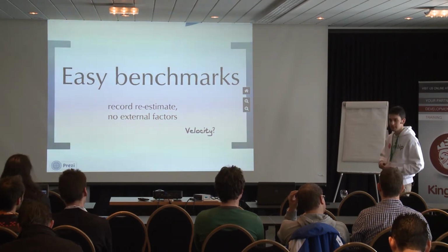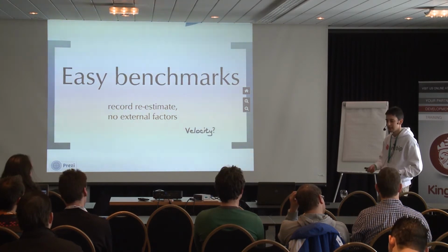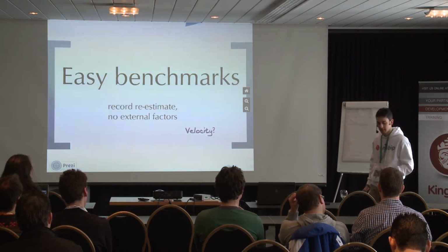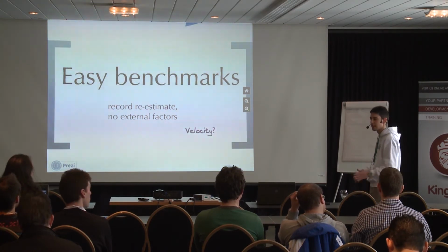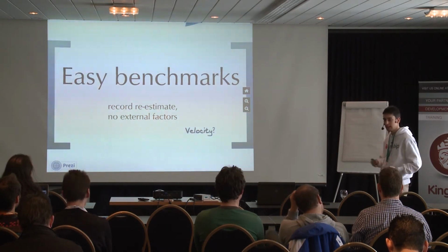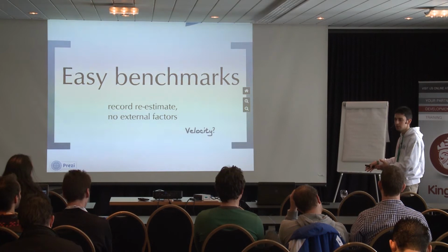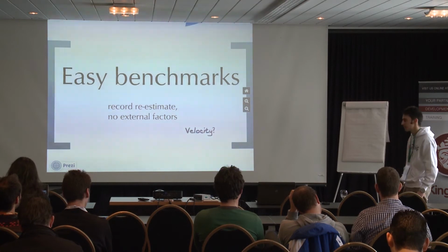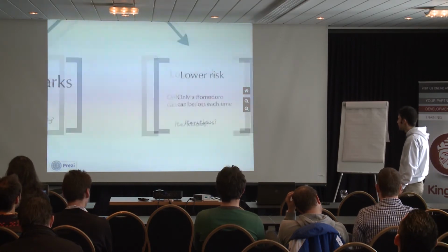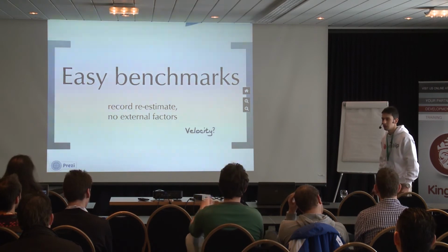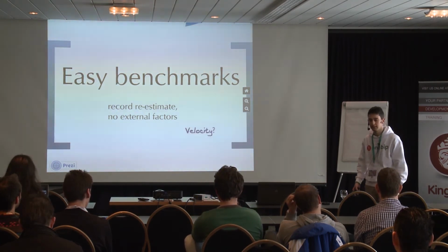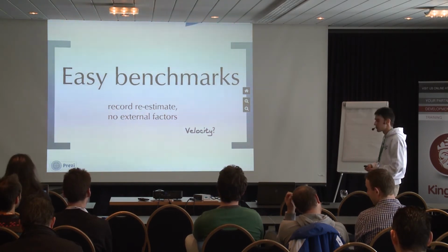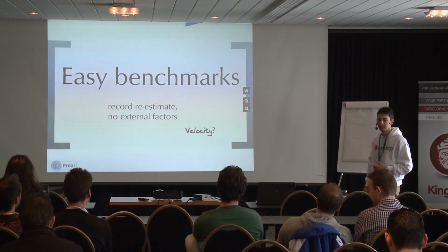If you do not track time, you cannot assign this time to the task that you have performed. With Pomodoros, you are forced to do a single task for the duration of a time unit, so it's very easy to then assign Pomodoros to what you have worked on, even if during a day you have switched between different tasks, but only between Pomodoros. This is not as precise as measuring velocity, which is a better measure of productivity for the team that will serve you well at a bigger scale, because recording Pomodoros is estimating effort.